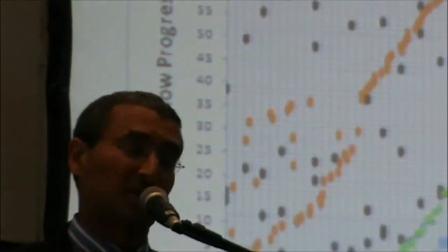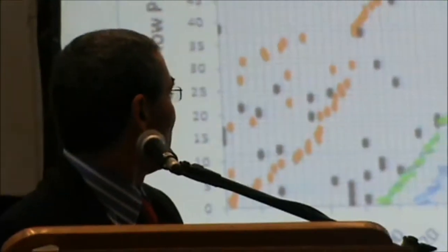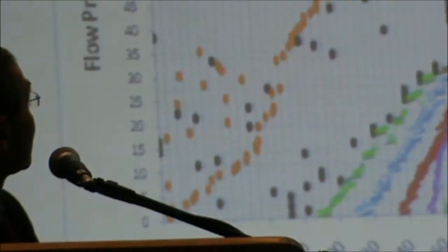So then we introduce a second strategy that we call lean process flow, which is really pull. And here we're using a Japanese system called Kanban, where we don't allow people to work unless there are teams available to follow on from their work. So you don't do things unless it's useful, unless somebody can actually do something with the products you generate. And then we get this kind of result, which again is a whole lot smoother, and it results in much higher productivity for all of the teams.